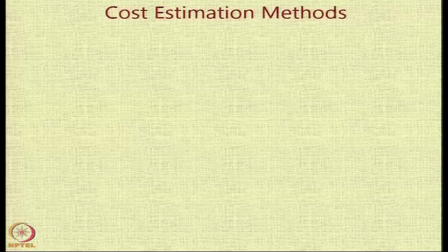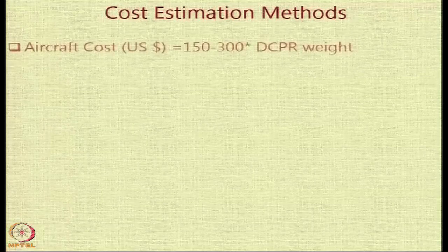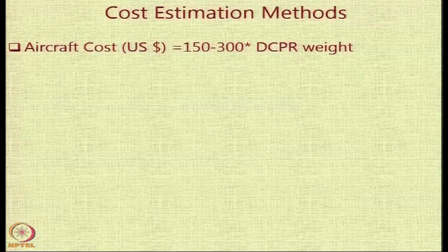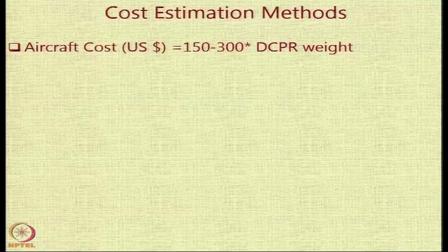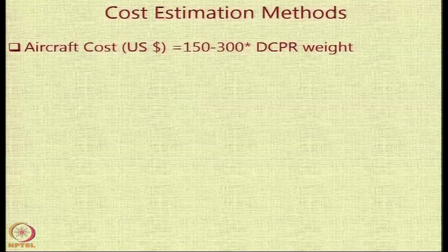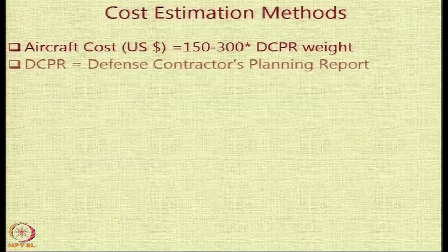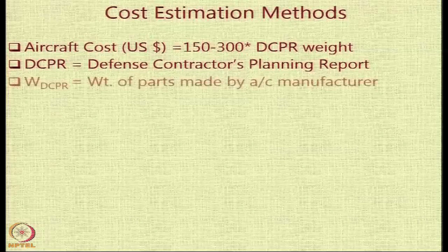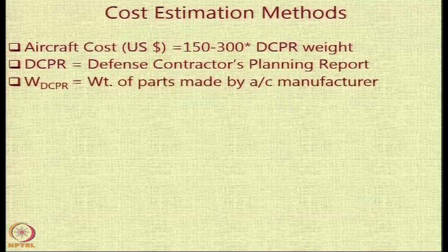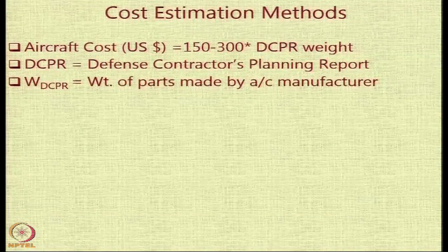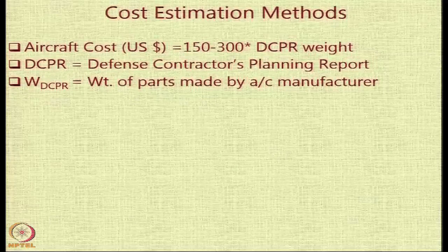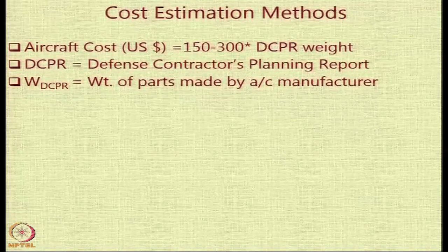The cost estimation methods for the RDT&E phase exist at various levels. One simple way is to assume a cost per kilogram of the aircraft using something called the defense contractors planning report, or DCPR weight. This weight basically consists only of the parts manufactured by the aircraft manufacturing company; all other parts which are outsourced or procured from other vendors are not included.